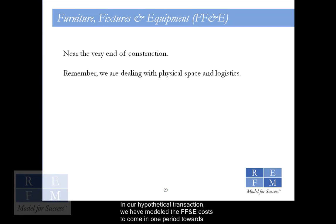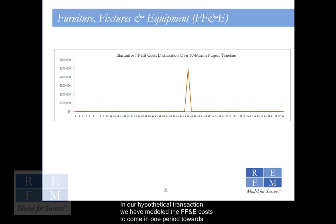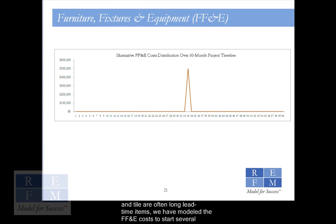In our hypothetical transaction, we have modeled the FF&E costs to come in one period towards the end of the construction schedule. Because furniture, carpet, and tile are often long lead time items, we have modeled the FF&E costs to start several months prior to the end of construction to ensure delivery in time for installation.